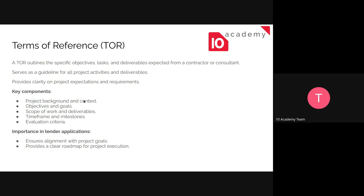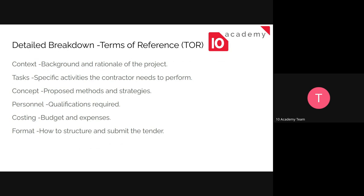The key components are: project background and context — this is just the introduction part — objectives and goals, scope of work and what's expected from us to deliver, time frame which is the time frame expected for us to finish in, and evaluation criteria. They're going to use these evaluation criteria in order to award us. It's important for tender application just to ensure alignment with project goals, and it provides a clear roadmap for project execution — good for both the tender and the consultant, showing what to do, when to do it, and how to evaluate it.